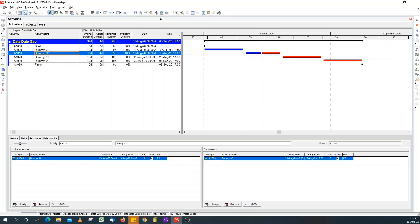Before I issue the schedule, I'll take out the time period. Except it's a site schedule where they work 24 hours and they need to see the start and finish times.